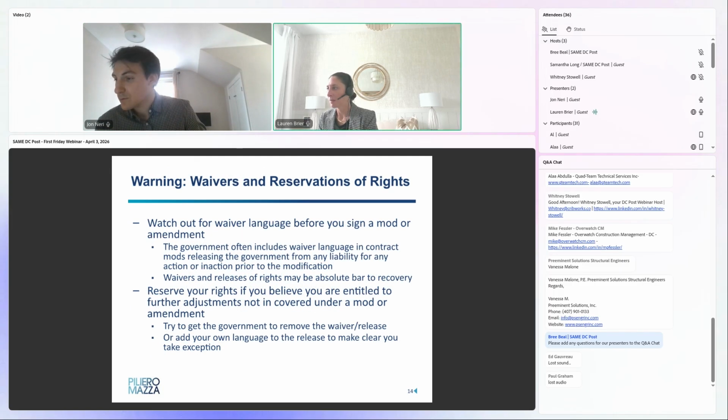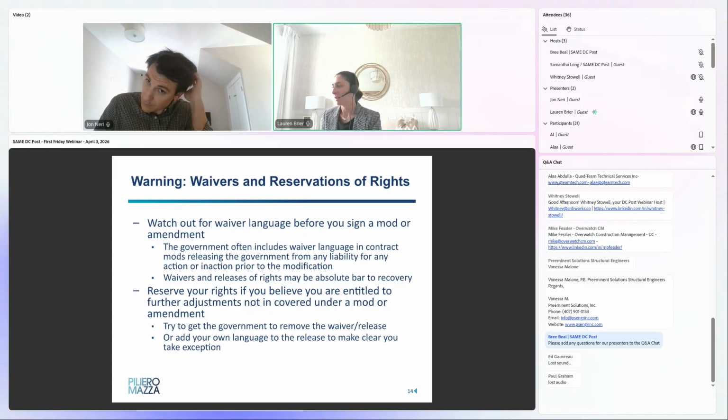All right, thank you, John. I'm going to jump back in here and talk about some practical warnings, including waivers and reservation of rights. One of the things you need to keep in mind, just operating in the federal space, is that a modification from the government is not something that you have to sign as is. If it's a bilateral agreement, obviously, unilateral agreement is what it is.